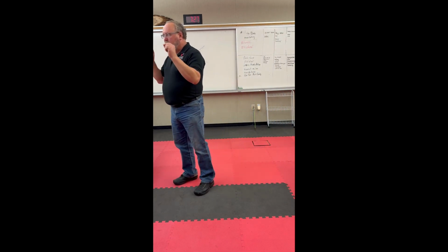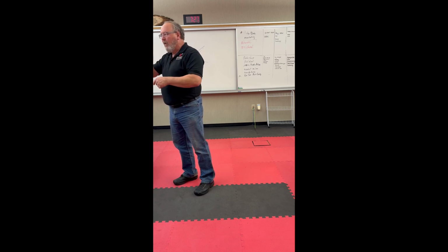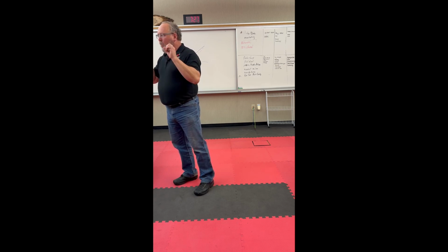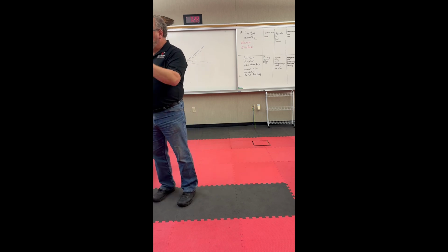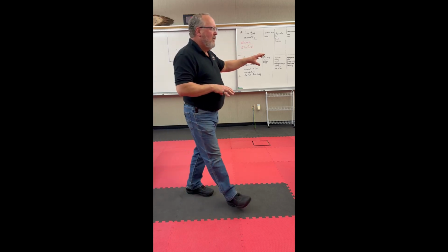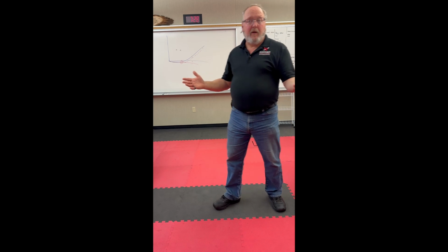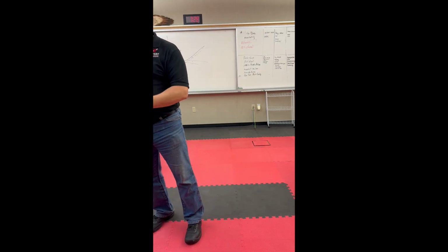So you sit down as a team, or sit down as an individual, and you go through all the different things that I have to do and write down everything that has to get done in order to make that milestone happen. And make each of those items sub-milestones. In order for that to happen, I have to complete all these other pieces. And then you have to make a guesstimate of how many hours it's going to take for you to do each of those little steps. And then put those into a calendar and say, how many hours a week are you going to be spending on this program? Got a guess? 10, 20. 10, right? So we realistically put in 10, and then we use the other 10 for when we get behind.